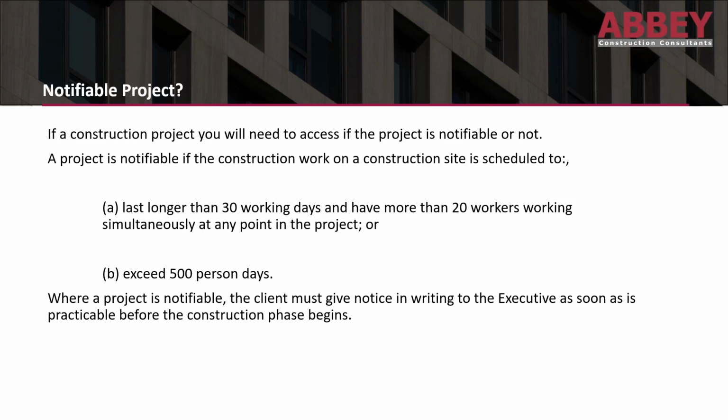If it's a notifiable project under CDM 2015, then you need to make a notification to the HSE using the form F20. So a project would be notifiable if it lasts longer than 30 working days and has more than 20 workers working simultaneously at any point within that project or within those 30 days, or if it exceeds 500 person days. That's where a project would be notifiable. The client must give notice in writing to the Executive as soon as is practicable before the construction phase begins.